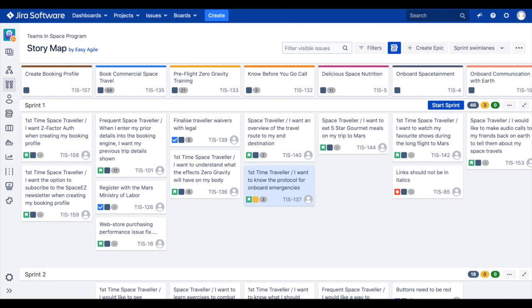We can also use these estimation lozenges to check in throughout the course of a sprint. For example, if we're halfway through a sprint and we can see that the majority of our work still remains in the to-do or in-progress status categories, we can start to de-scope our sprint and move work into the following sprints. Teams can start and complete their sprints without having to leave the story map.